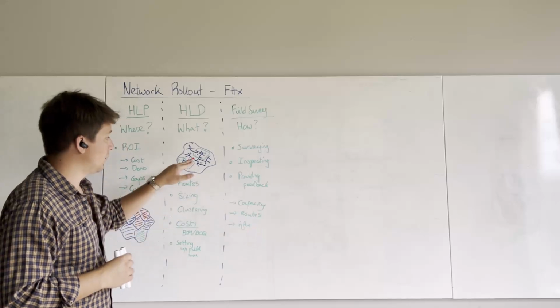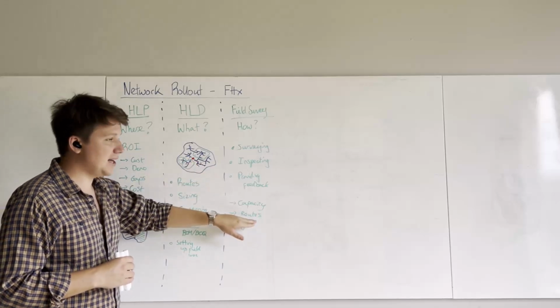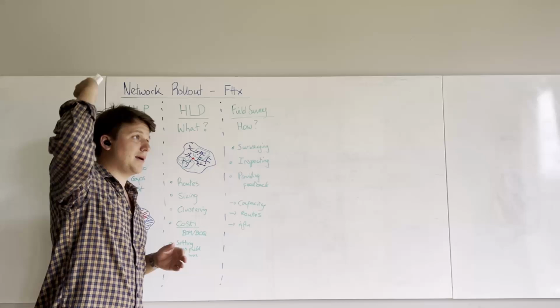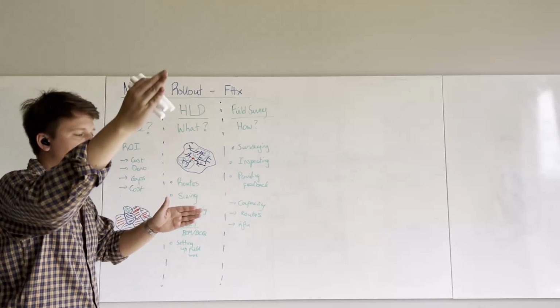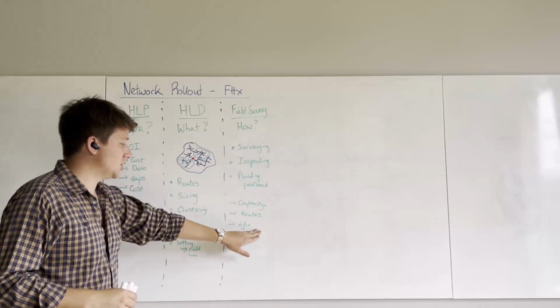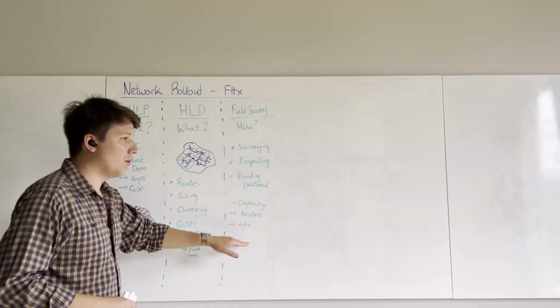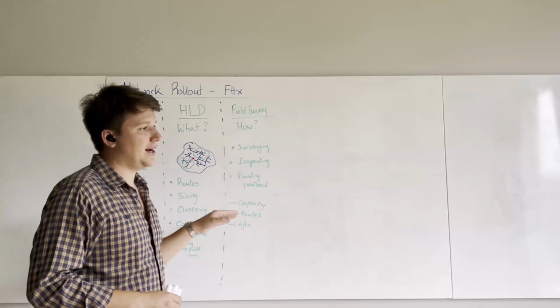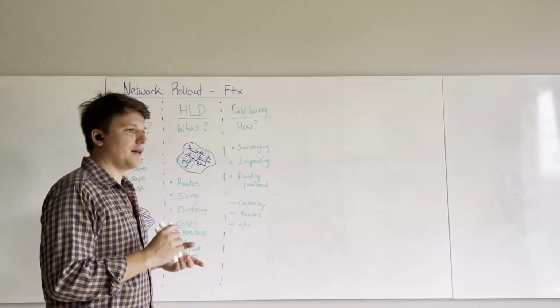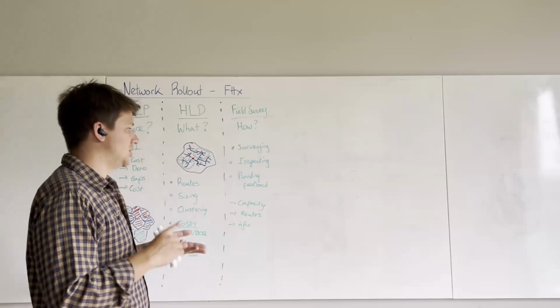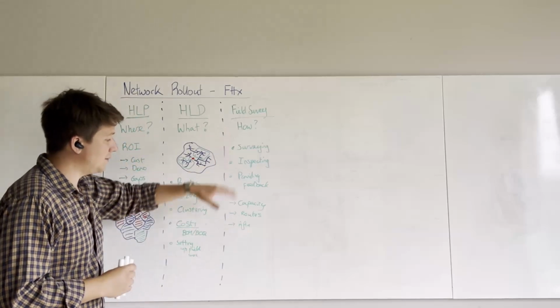The routes, we want to go down certain roads. Does that make sense? Or are there big, massive oak trees that we're not going to be able to dig up down that road and we need to go down the other side of the road? Infrastructure, can we leverage poles? Can we leverage underground assets? Can we place manholes in locations that we're planning when there are things like bus stops and street furniture, etc. in the real world? And you want to capture all of that.